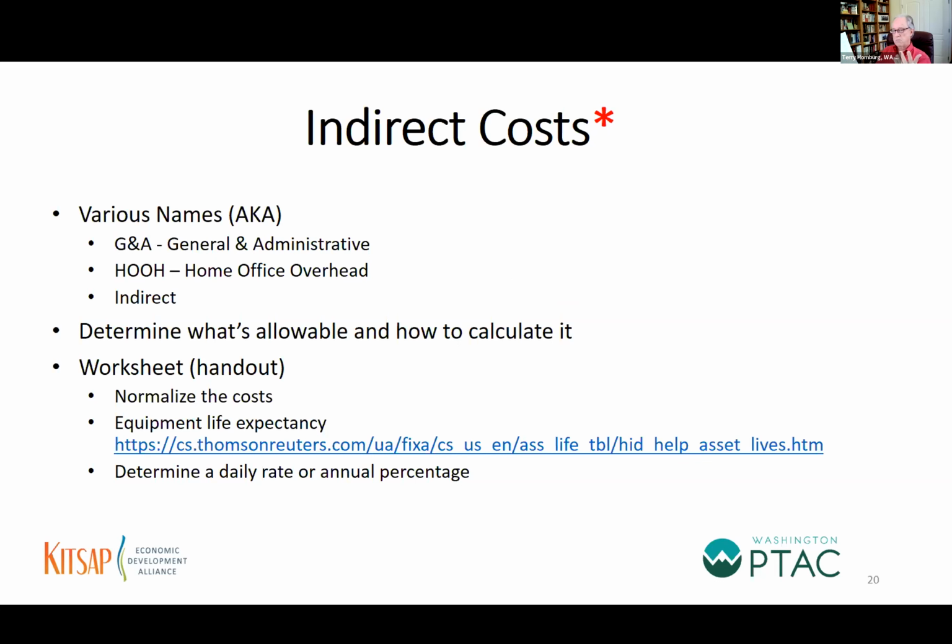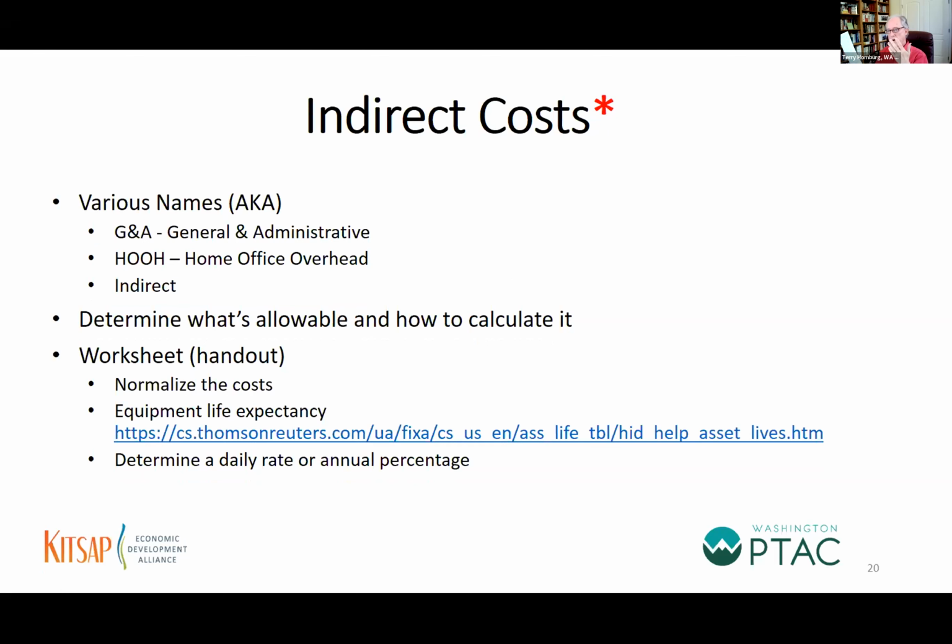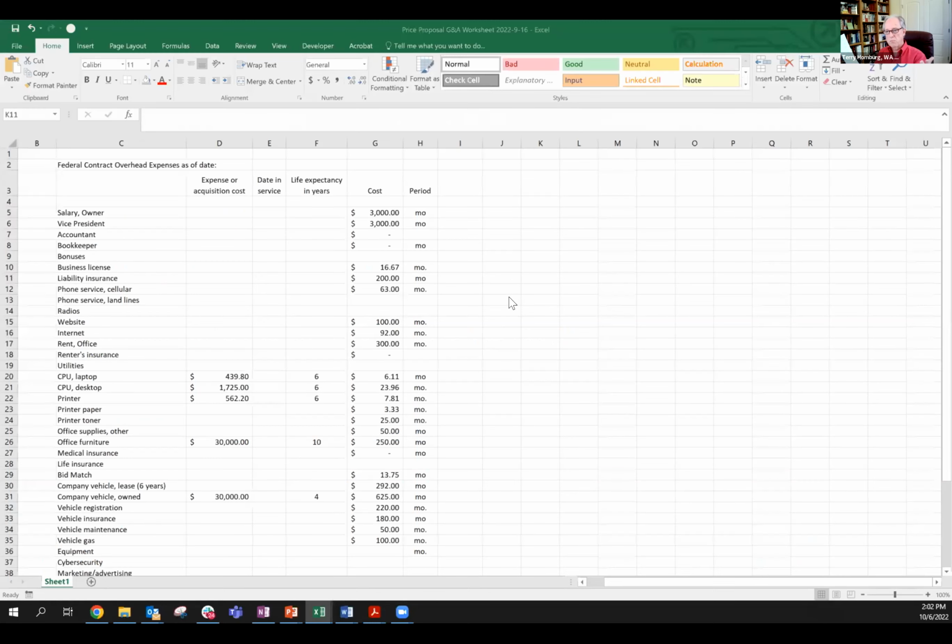So I mentioned an example earlier, insurance. Auto insurance is typically every 6 months. So you get a bill every 6 months, but you're going to normalize it. In this case, I normalized it to the month. So if my bill for auto insurance is every 6 months and it's $600, then I'm normalizing it down to per month.